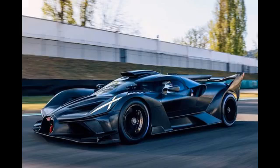Goals, measurable performance gain of 900 horsepower on the dyno test. Scope of work, engine rebuild with specific high-performance components to be identified by LJRC based on vendor recommendations. Milestones, completion of engine rebuild and dyno testing within 6 weeks to meet the racing season schedule. Submission requirements, detailed breakdown of parts, labor costs, and guaranteed minimum horsepower increase with warranty terms.